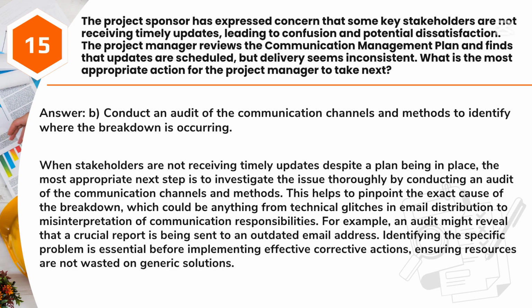When stakeholders are not receiving timely updates despite a plan being in place, the most appropriate next step is to investigate the issue thoroughly by conducting an audit of the communication channels and methods. This helps to pinpoint the exact cause of the breakdown, which could be anything from technical glitches in email distribution to misinterpretation of communication responsibilities. For example, an audit might reveal that a crucial report is being sent to an outdated email address. Identifying the specific problem is essential before implementing effective corrective actions, ensuring resources are not wasted on generic solutions.